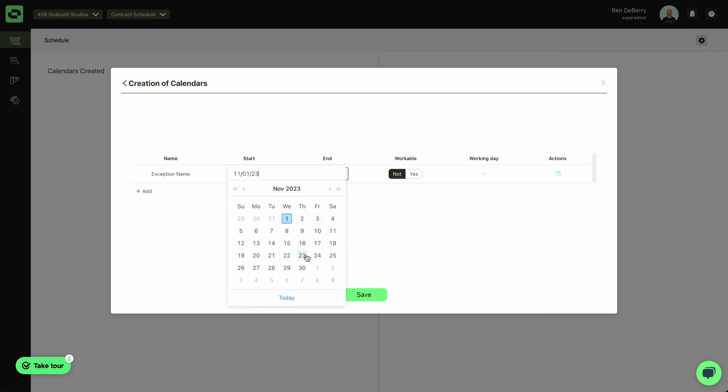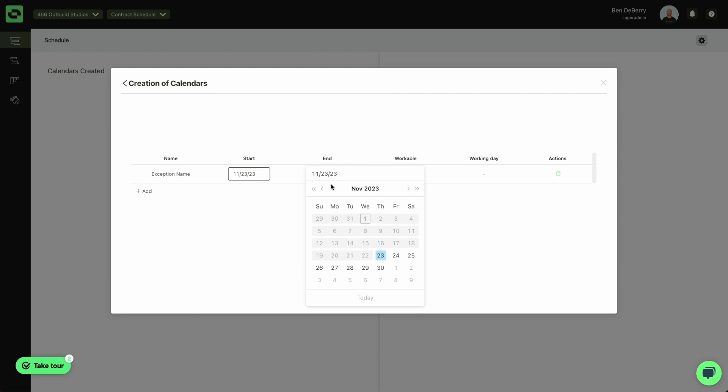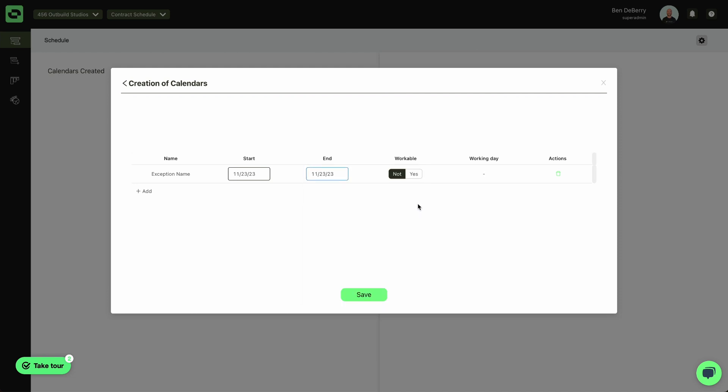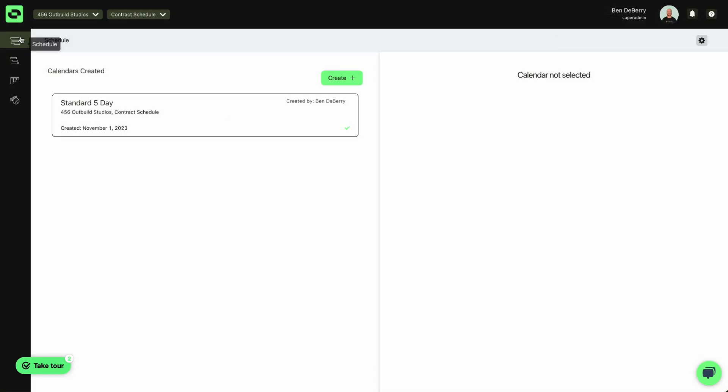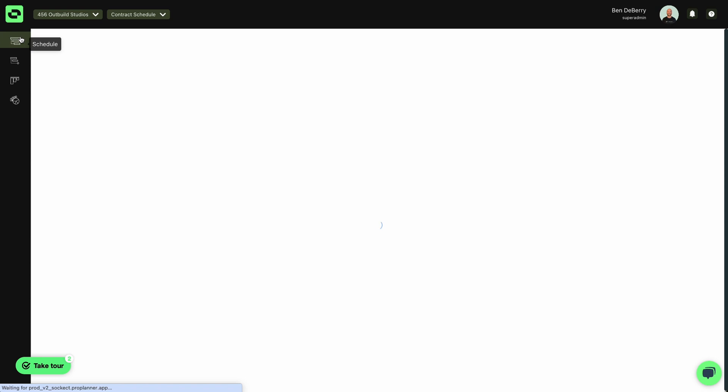So let's go ahead and mark Thanksgiving as a non-working day. I'll name that. And now I've created my first calendar and I'm ready to open up my schedule and begin building.